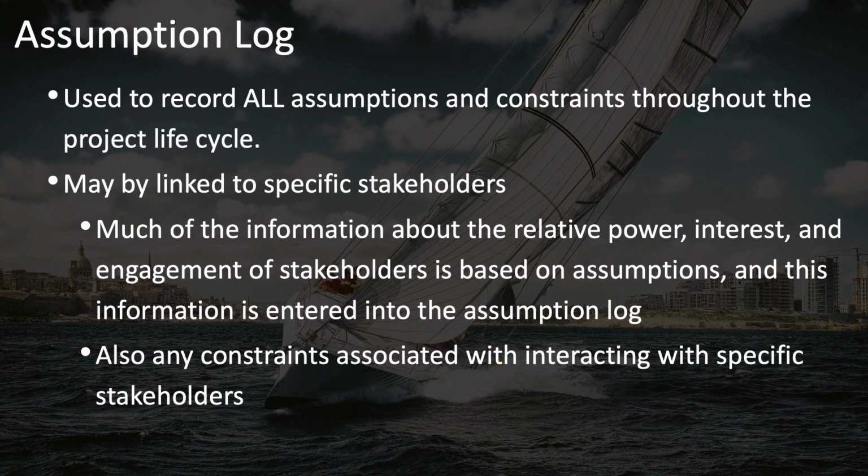At the same time that you develop the project charter, you'll also begin the assumption log. This log is used to record all assumptions and constraints throughout the project lifecycle. Although it starts early, it lasts throughout the project, and you should record all assumptions and constraints no matter whether they're high level or low level or where they come from. They all go into this assumption log, which starts here.